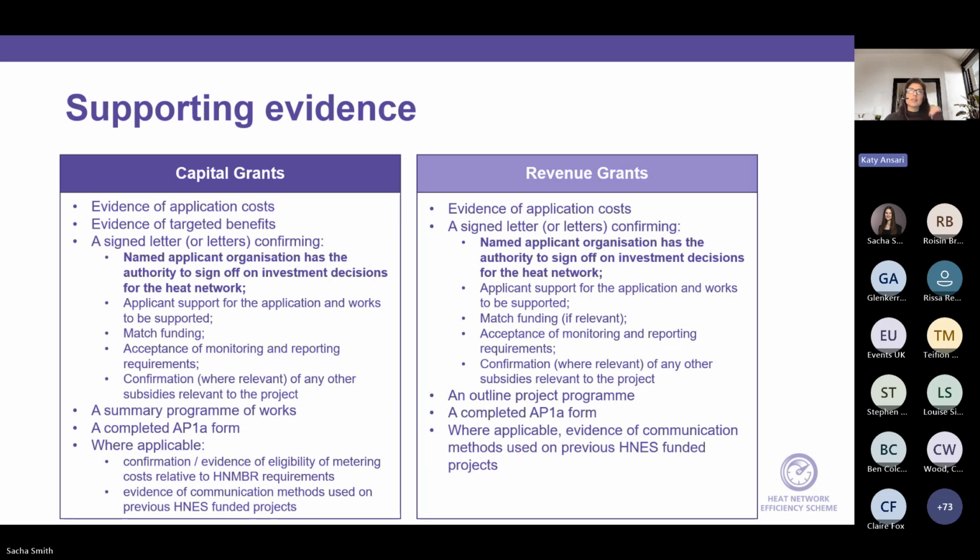As for supporting evidence then, for capital grants, we need evidence of the application costs. So we do need any quotes that have been gathered. This should include all of the measures that are planning to be undertaken, any of the prelims and contingency costs. We do need evidence of this.